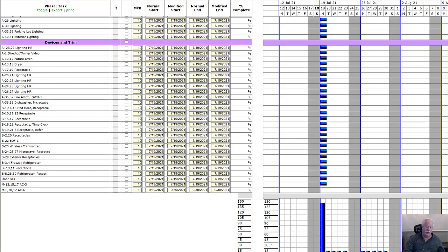What I'm saying is, if you're a few hours over 15 men, it might throw another 2 or 3 in here for the next day, right? You're talking about an extra 15 hours worth of work. You're not going to get an exact perfect curve, but you need to get it as close as you can, and in the field it'll all smooth out as you build your project. But you do need to get it close.